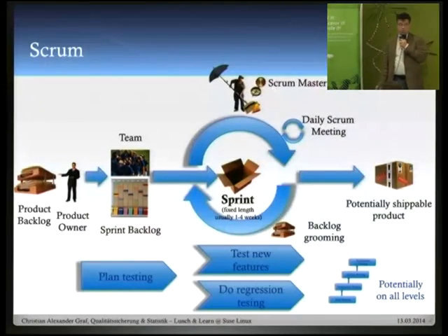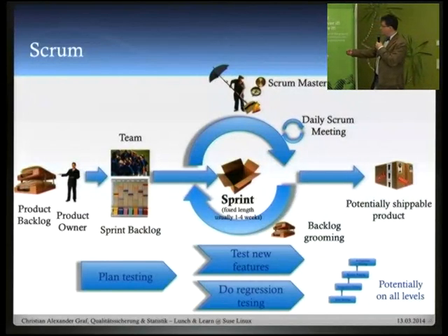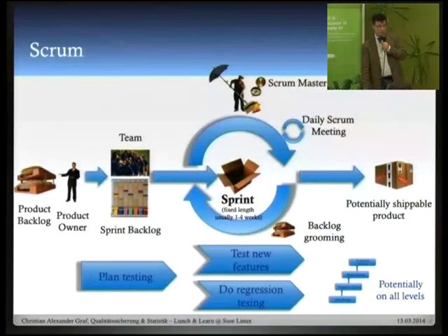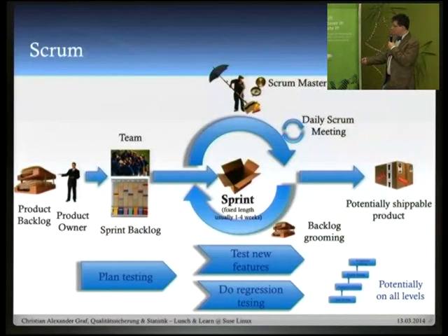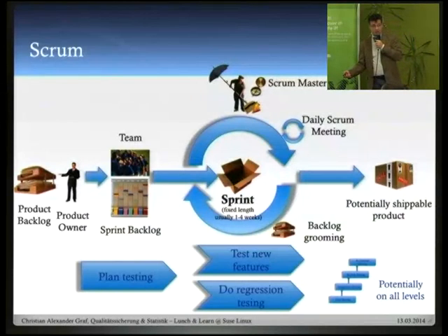And that's why I need a great deal of regression testing. Because otherwise, when implementing new things, you always run into old bugs, so you won't proceed with what you actually want to implement. That's why, when you're doing Scrum, you should start doing proper testing, in a way that you can do regression tests right from the start. Because otherwise your teams will not be fast. They will be stuck with the old bugs.